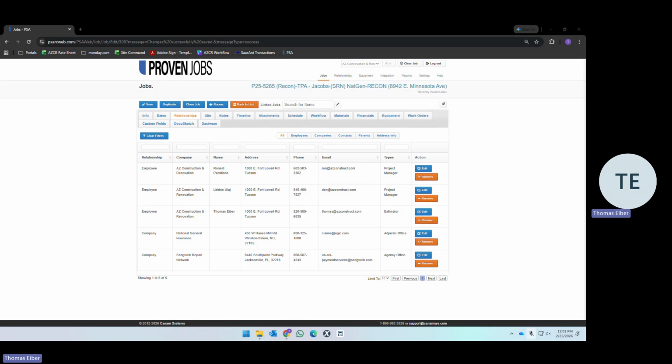The efficient closeout, so quick to COS or PSO, and then quick to PCN. Those acronyms should be familiar from this video, but COS being Certificate of Satisfaction, PSO being Project Sign-Off, PCN being Project Completion Notice. The efficient closeout requires that last walk to quickly go from that customer being happy about the job being completed to getting a sign form to getting a PCN date put in the system. The faster that happens, the faster we get paid, and that closeout happens quickly. That is what you're being measured against.